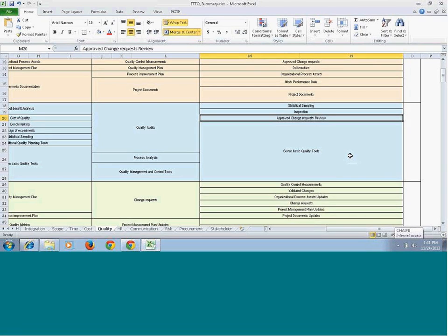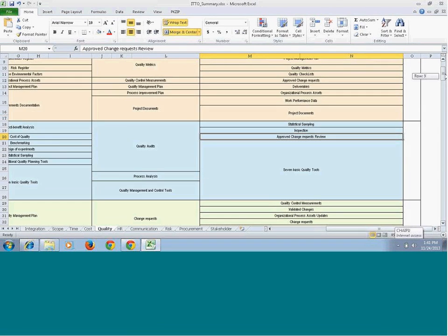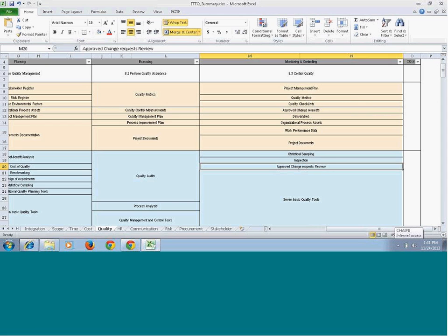Then the histogram is a kind of bar chart over time, and then control charts, where you will plot your baseline, and then plot your sampling data, and if it goes out of the control line, then you have a problem there. So you have to plot the control charts to find out if monitoring and control is working as per your plans or not.